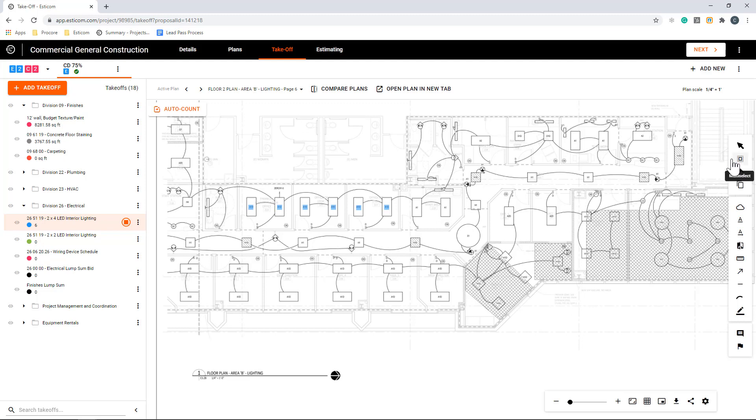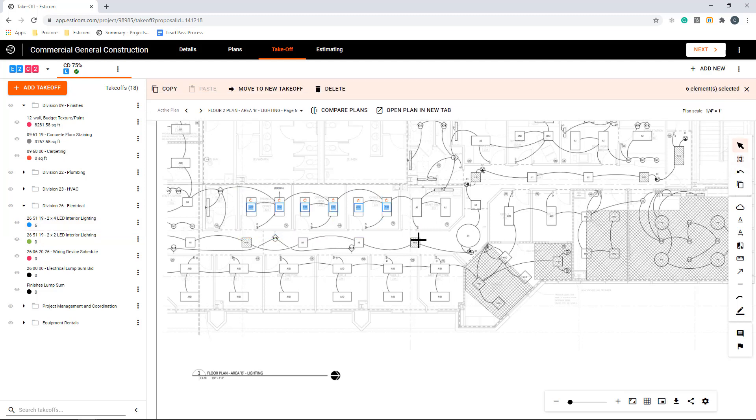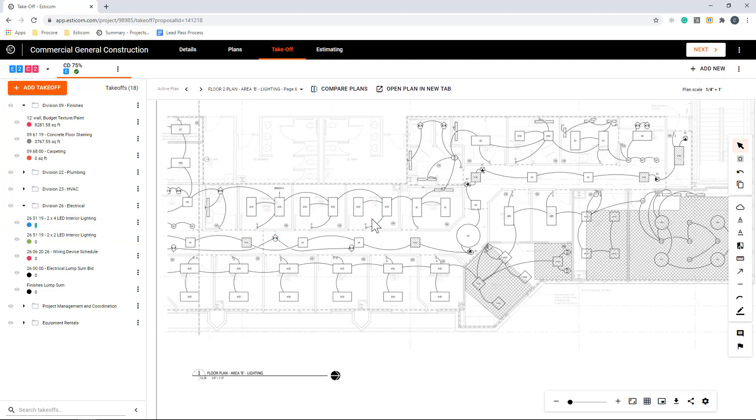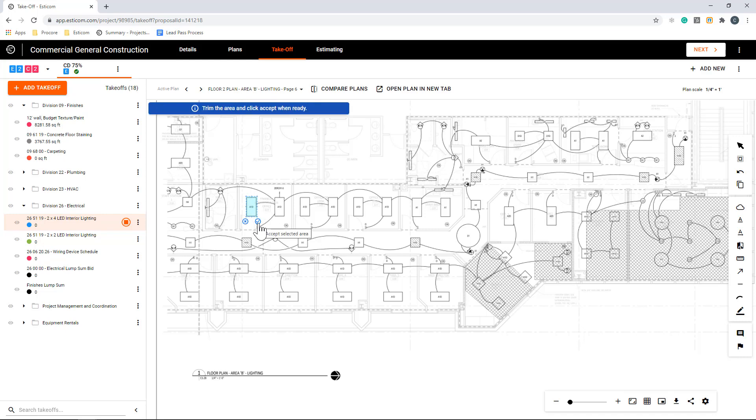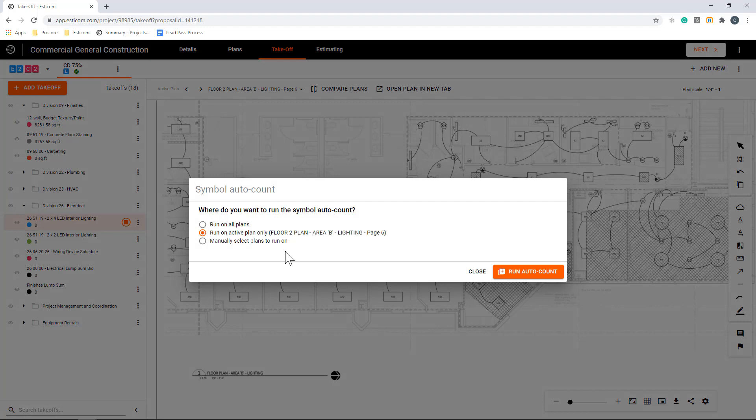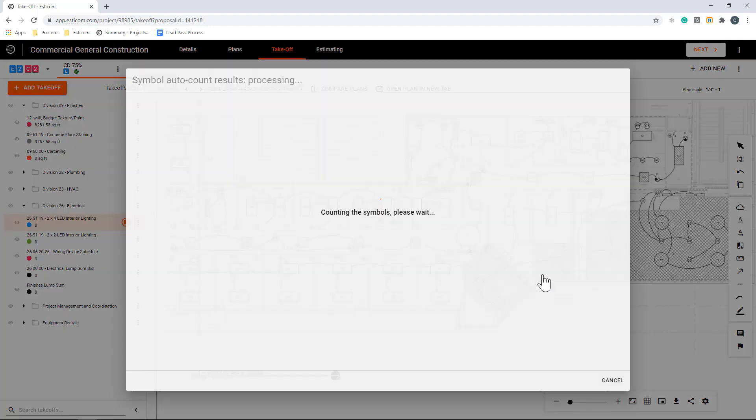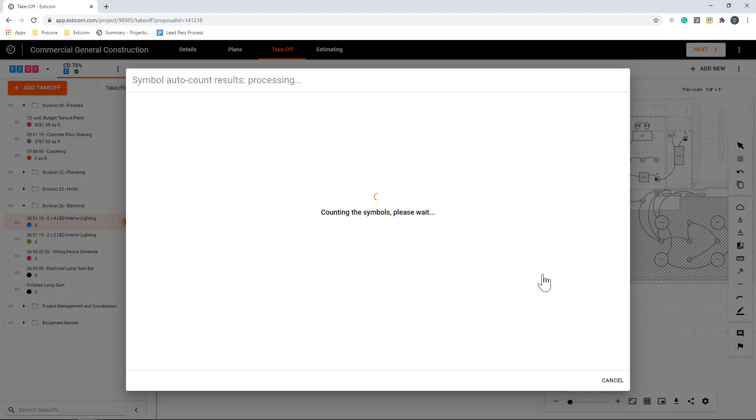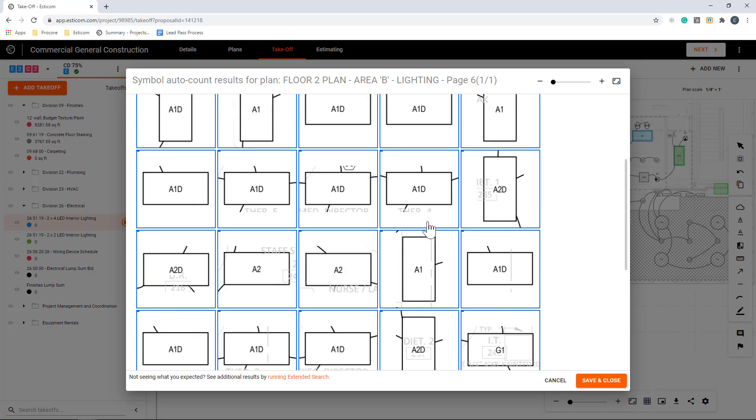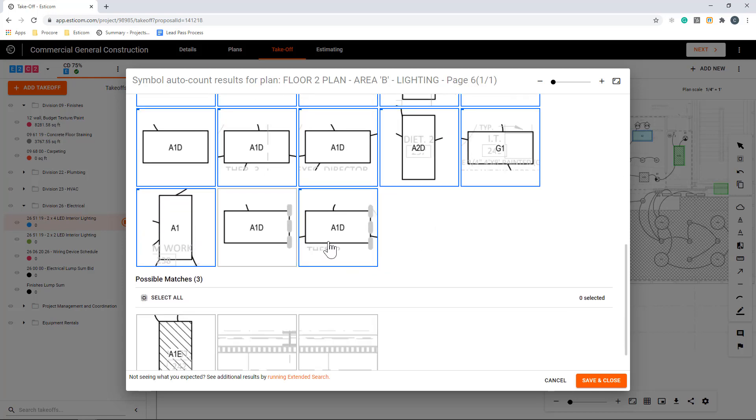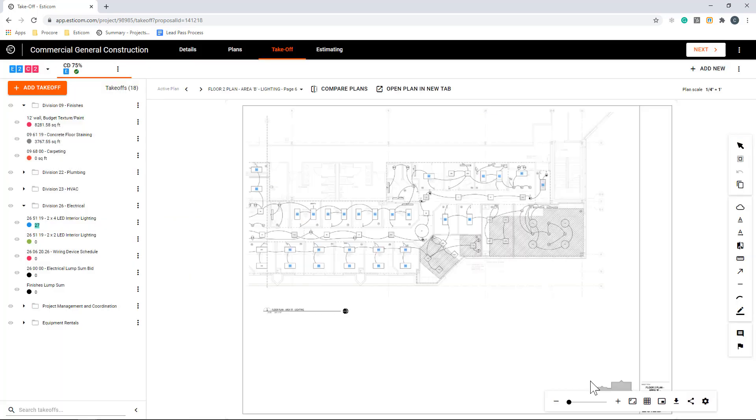In this example, there are quite a few light fixtures and other items to count, so I'm going to leverage our auto-count feature, which will automatically count a selected item across multiple plans. You can do this by clicking auto-count and then drawing a rectangle around the desired item and telling the application what sheets you would like to search. I'm going to only search the current plan for this example and click start. Give it a few seconds to run, and it'll return your results. Now you can browse through and select and deselect any items that are applicable and click save and close.